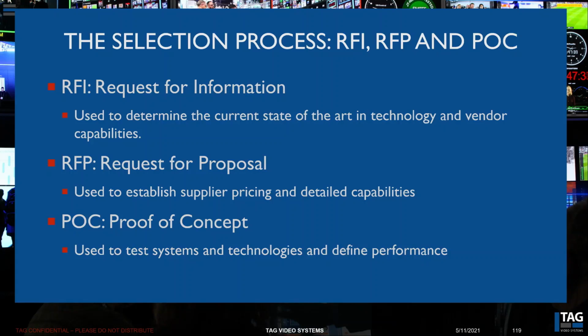And you go from there and you do an RFP, request for proposal, to various vendors where you're trying to define who can actually achieve what you want and at what price. And you want to lock in that price now. You don't want to wait until later after you've figured out there's one vendor who really does it all and they know that, and then they give you a price. And lastly, a proof of concept. And we'll talk about that in a minute. But I think it's really important to do proof of concepts in this work, in this migration.